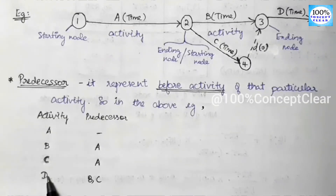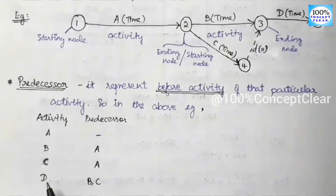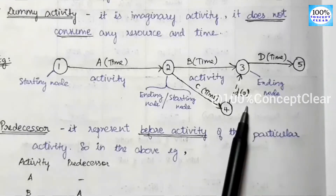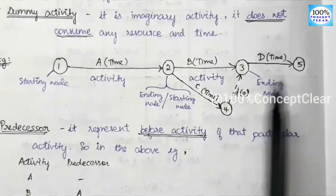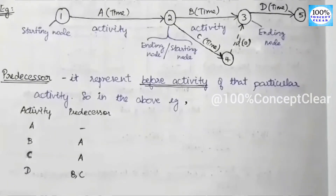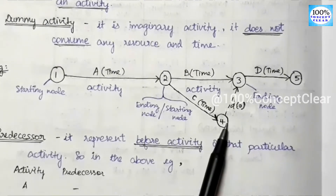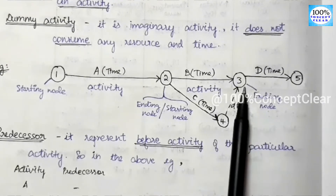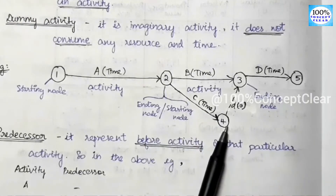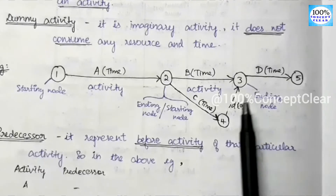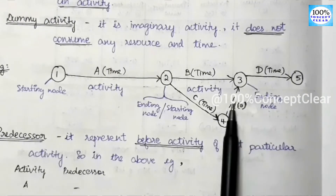When we start the D activity, we complete the sequence and order of the predecessor. B and C activities are both predecessors of D activity. B activity is complete at the third node directly. But C activity completes at the second and fourth node, so we include a dummy activity. The fourth node connects to the third node via dummy activity, so that D activity can start.